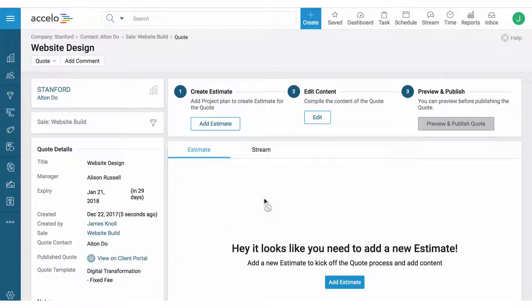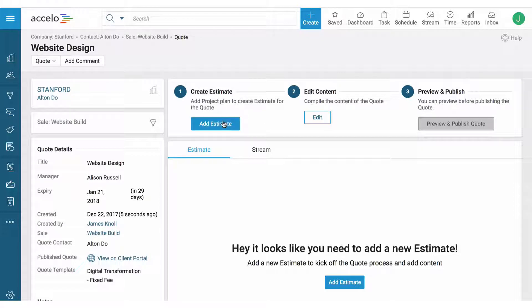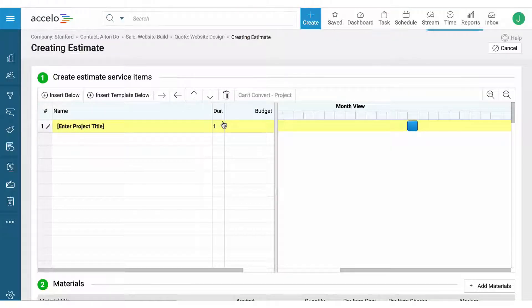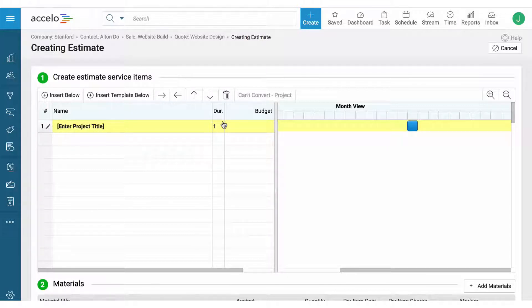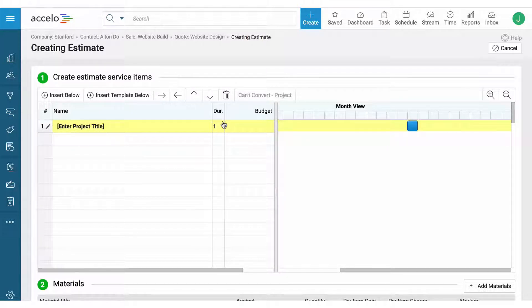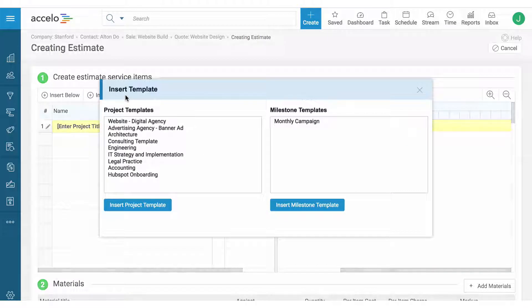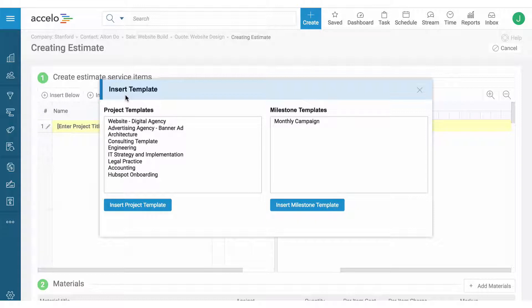There are three steps in creating and sending out a quote, and the first one is to create an estimate. An estimate is a project plan that can have things like timeline and budget. It doesn't necessarily mean that we're sharing it on the quote, but this project plan that we create here can automatically turn into a live project when the quote is accepted and completed.